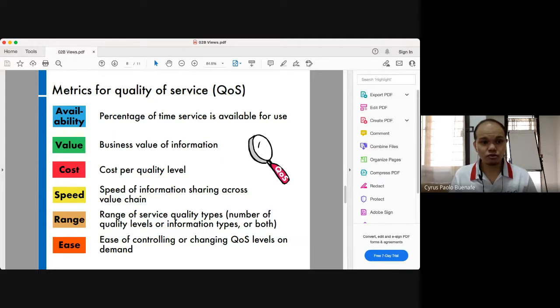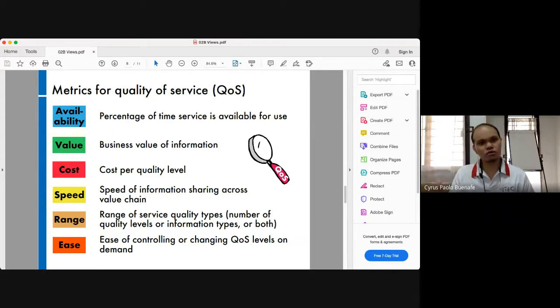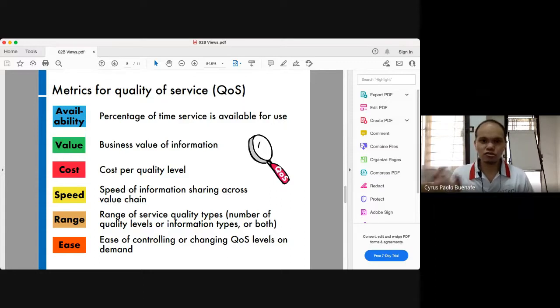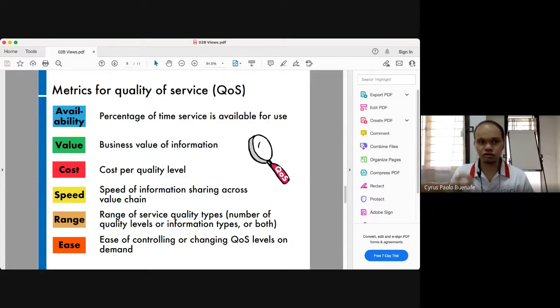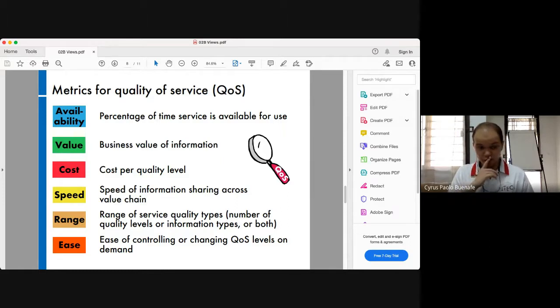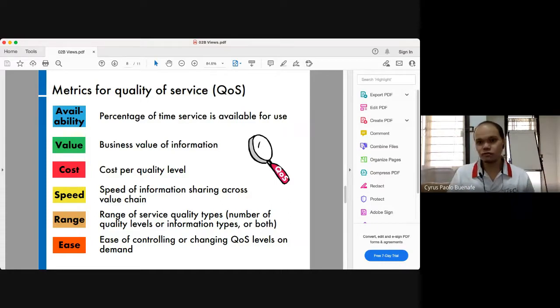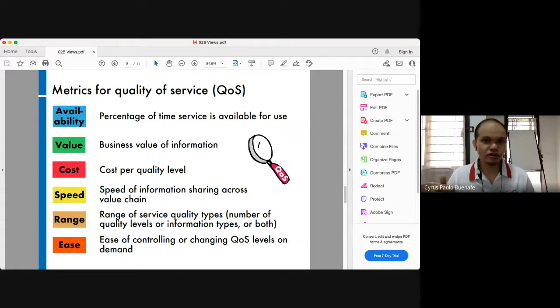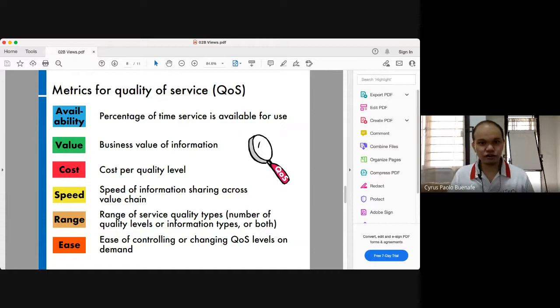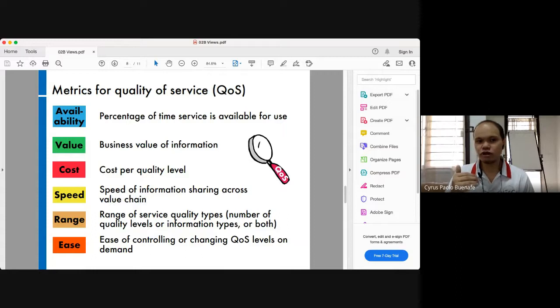When you say cost, I want to measure cost, that's a metric. What about cost? Are you looking at total cost, labor cost? What type of cost? And you can even drill that out further according to a specific period of time: labor cost per quarter, labor cost in a fiscal year, labor cost in a week, in a day.